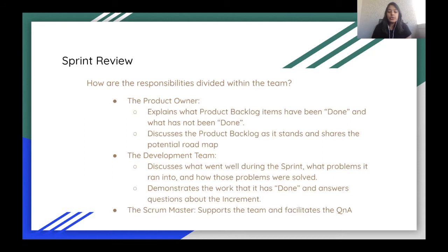And most importantly, the Scrum Master also facilitates the question and answer round, because you need somebody very neutral to know when a conversation has exceeded its time box. If it's a product owner, he might get into the product aspects of things, or the developer might get into the technical. So you need a neutral person to balance both product and technical related discussions. So that's where a Scrum Master comes in.